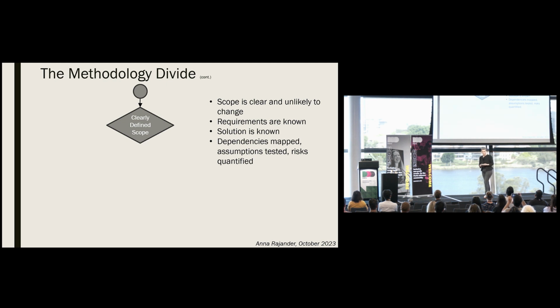Agile, with its rituals, involves a management overhead. The rituals are great for discovering and refining scope, requirements, and solution in cases where there is some ambiguity. But if these are known, there is no point investing in that overhead. It is not necessary. You may as well use a more waterfall approach.